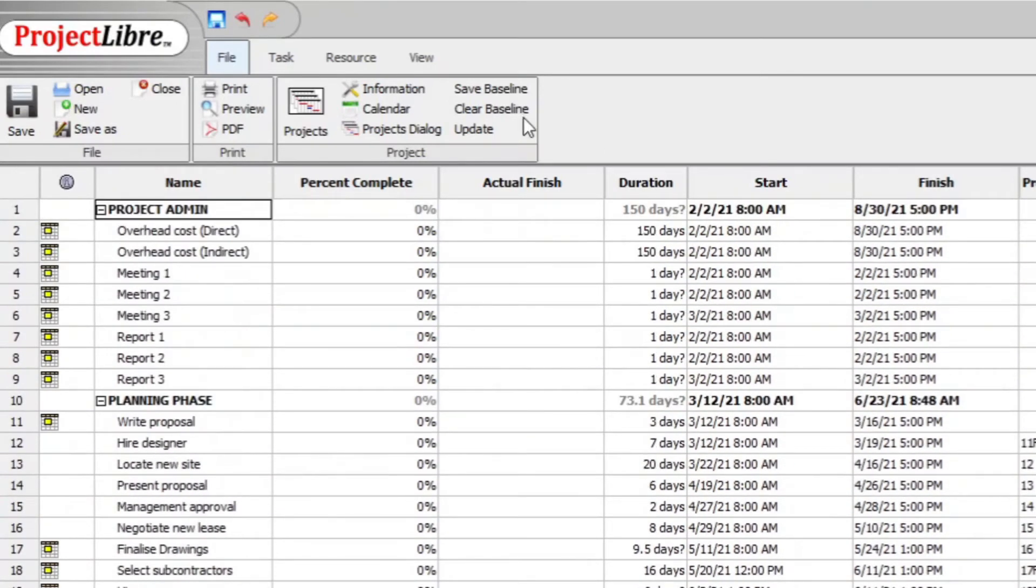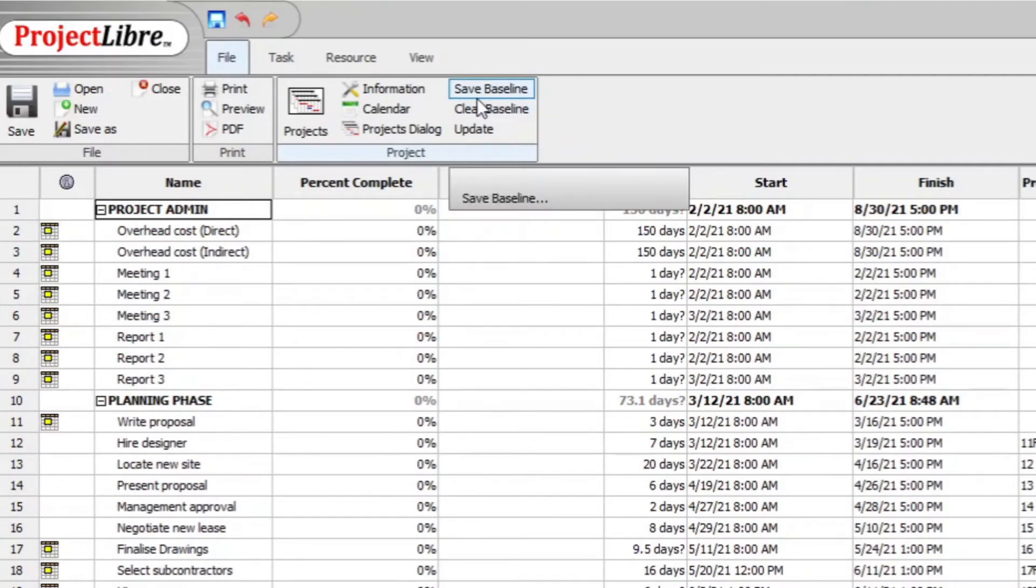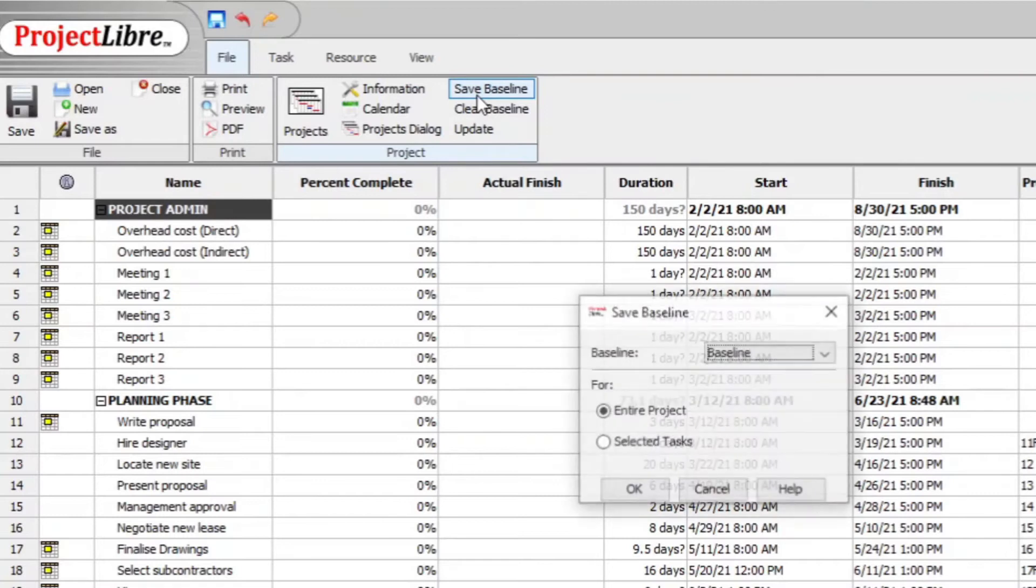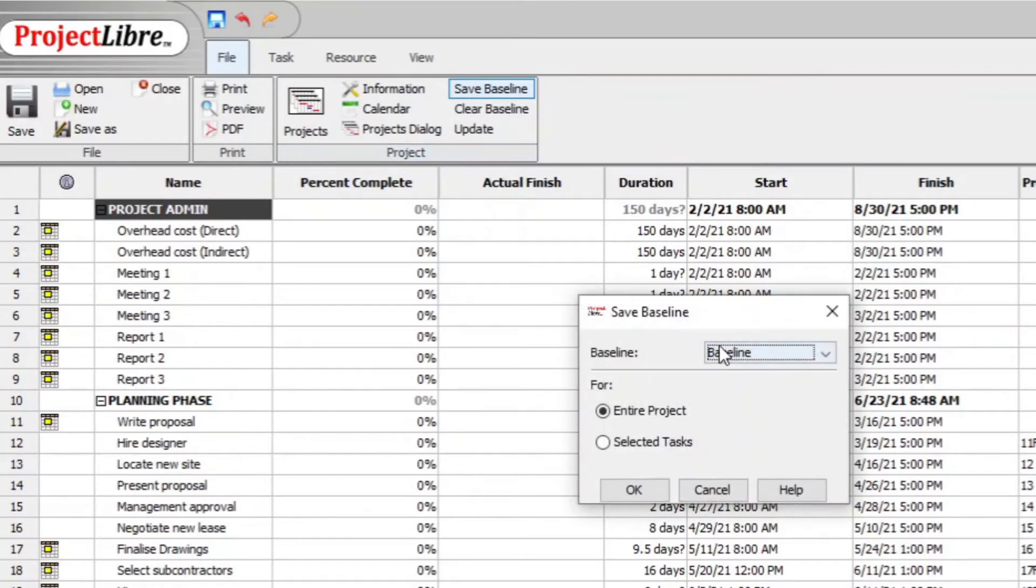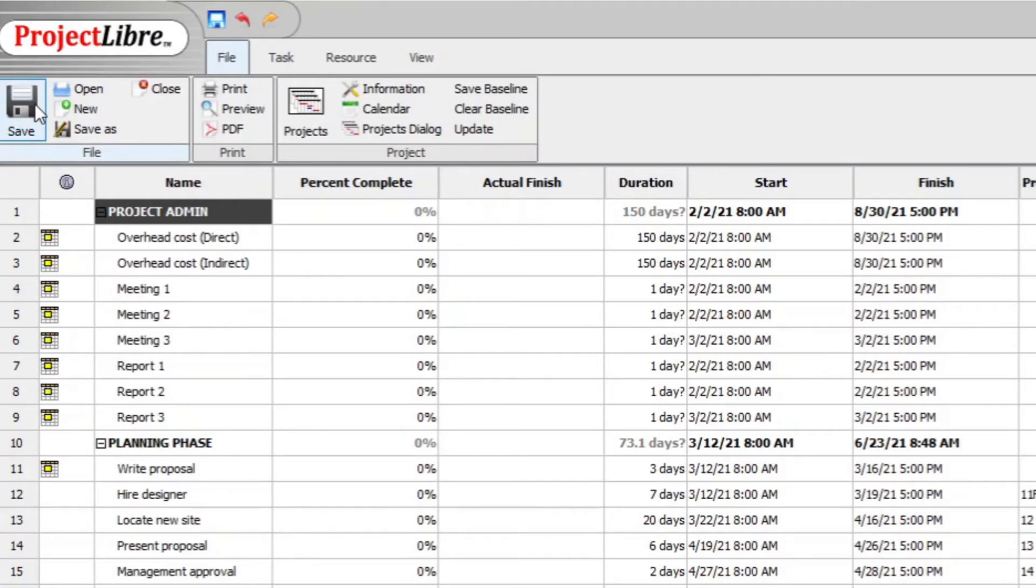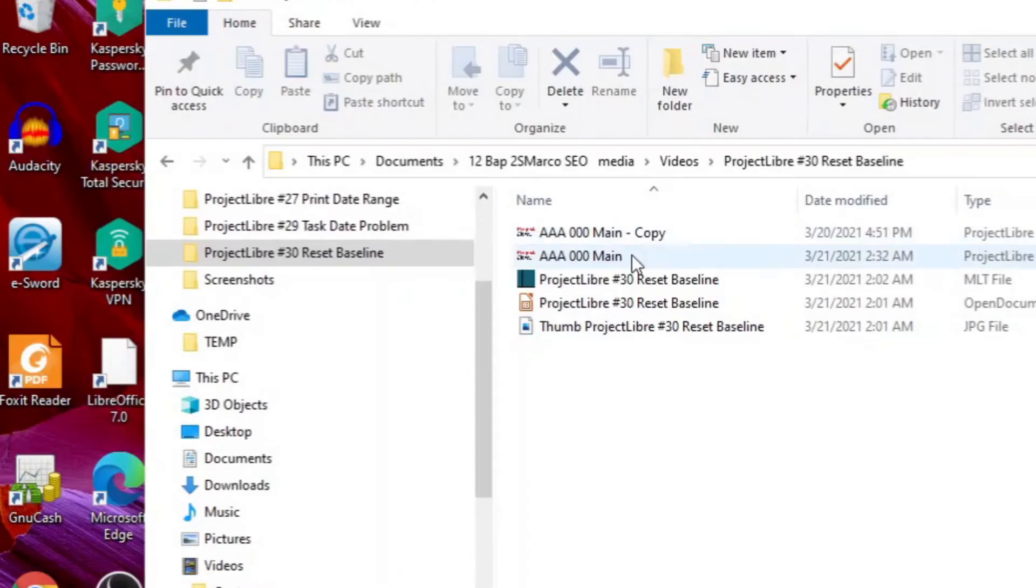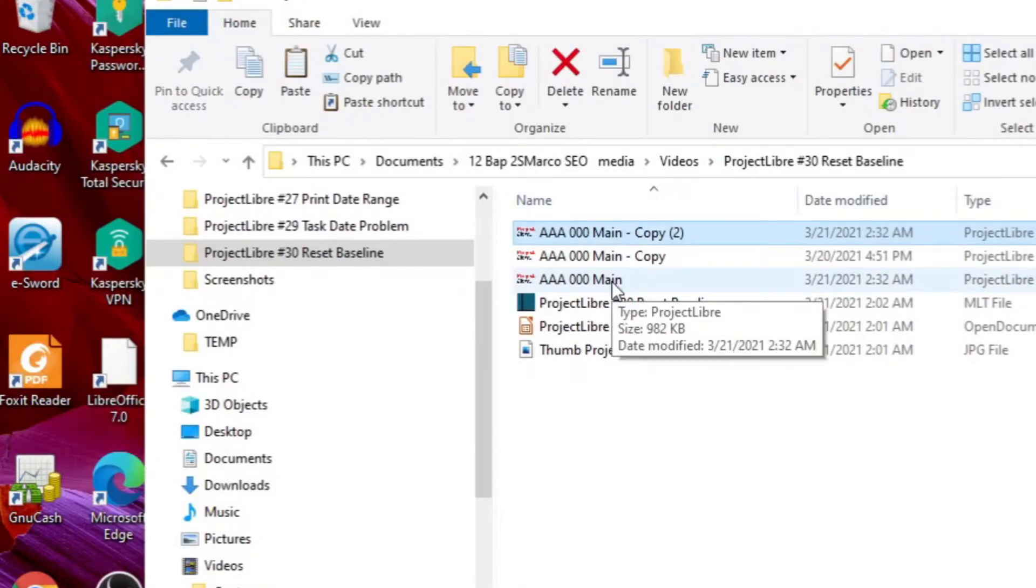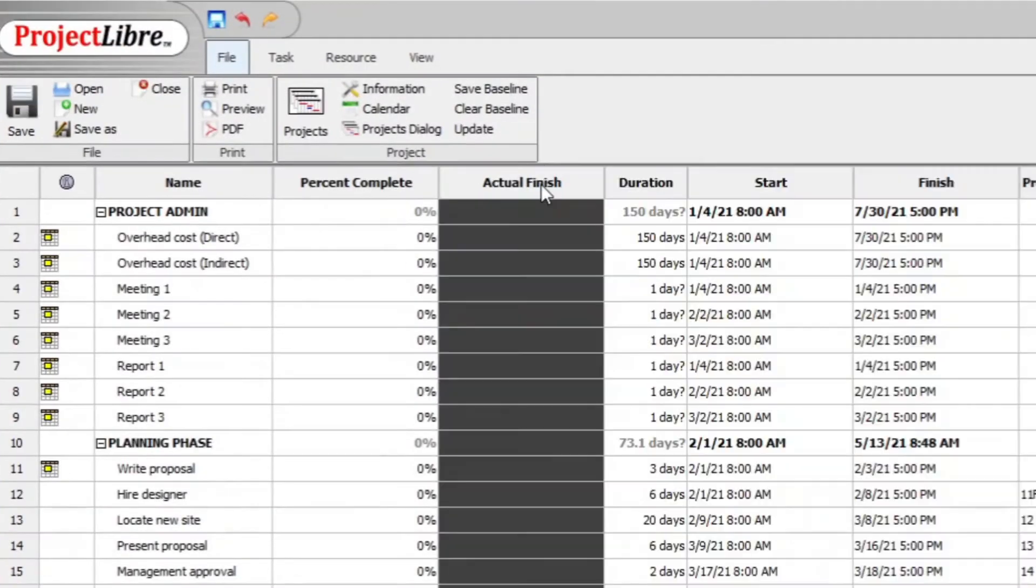And so you continue summary task is zero for your projects until you see everything is zero. When it is zero, you then save again a baseline because you now create another baseline. Save a baseline for the entire project. And then save it. And then every now and then, as I said, you make a copy of your work. So now everything is finished and completed.